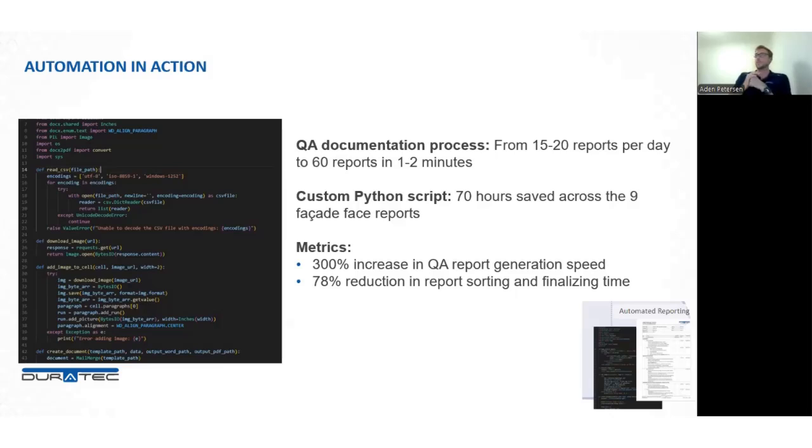Just let me put this into context. We had about 600 defects on the Carillion, each requiring documentation at multiple stages. We had identification, breakout, repair, heritage finish. We're talking about thousands of individual reports and PDFs here.